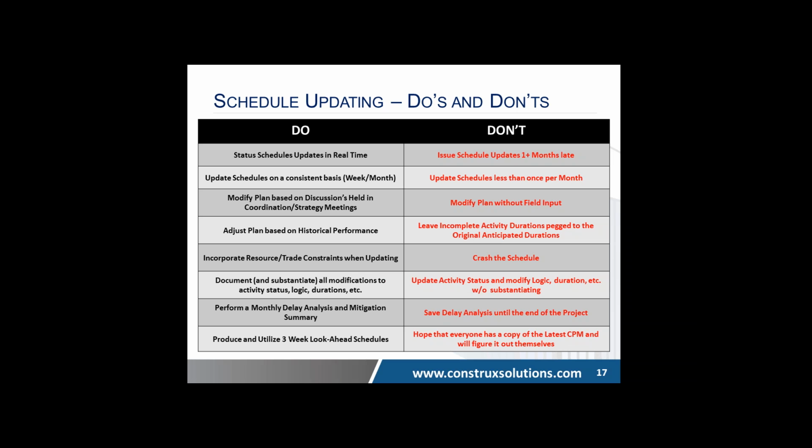Now, if you're not tying those logic ties in there and predecessors get delayed, what will happen is the schedule will then tell me that I can get 10 crews in there working on 10 floors at once. And that's just not likely. Generally speaking, it may or may not be likely, but generally from what I've seen, you can't get enough people to do that.